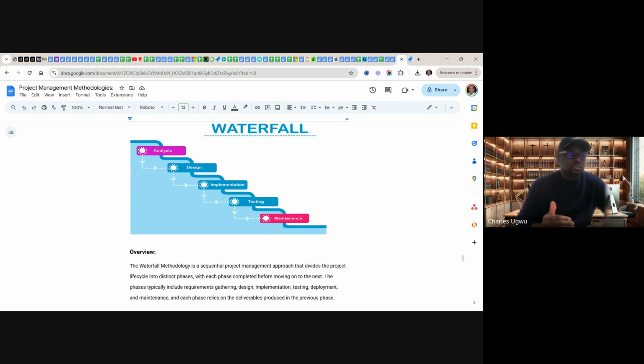But now, when we start with Scrum, we are going to use both waterfall and agile approaches together. If you can mix them together, that's what so many companies are doing. Use waterfall at the initial stage of the project to carry out a thorough analysis, then use agile for implementation.